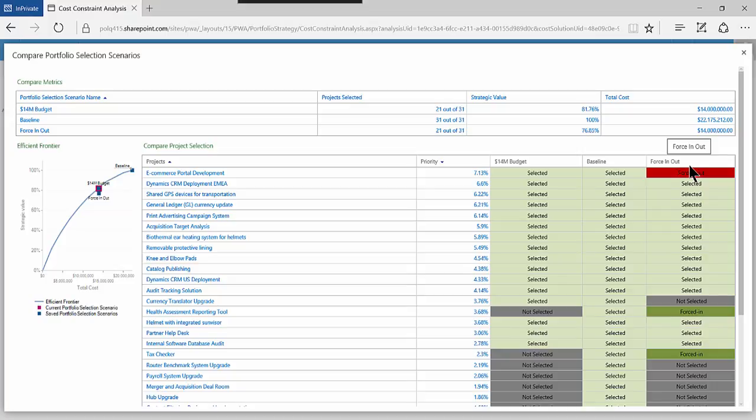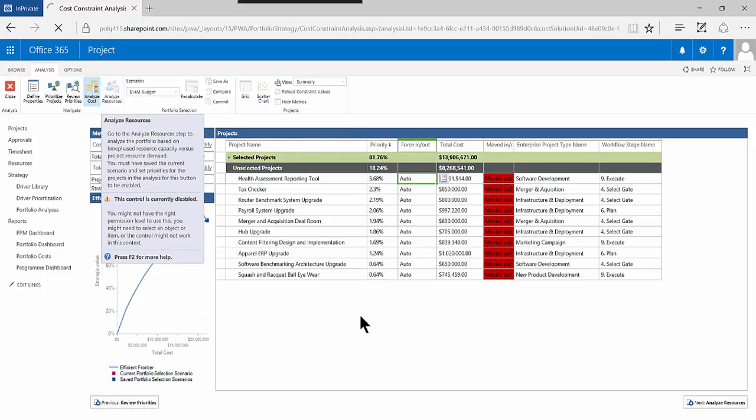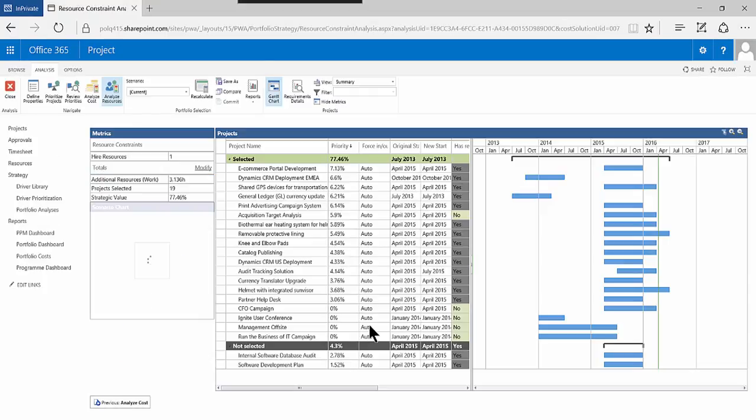So again, these what if scenarios don't impact what we're already executing, but they will take the data from that, and it gives us a great way to do that scenario planning on the fly as well. So rather than kind of going back to Excel, rerunning some model, it's available directly there at the same time. And if you want to, we can do that not only with analyzing cost, we can also analyze that against our resources, and we can do similar things. What happens if I change the start date of a project? What happens if I hire more resources? And I can also see where we have underutilization. So again, I might have all the money in the world to run the projects, but do I have enough resources? And we can take that as the next step if we wanted to.